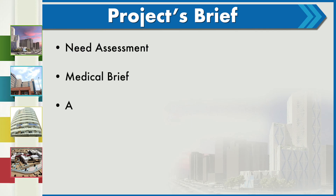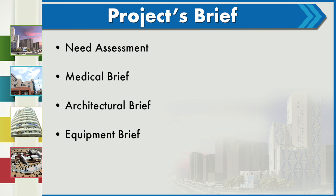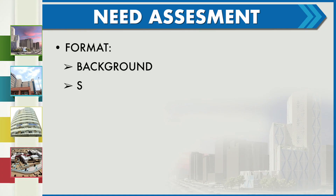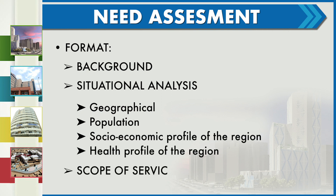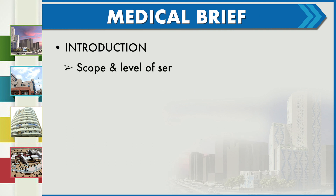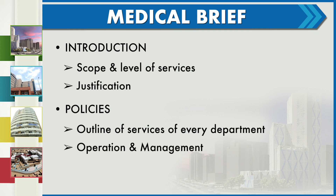The project brief will include the need assessment of the project. For hospital projects, it will include the medical brief, architectural brief, and equipment brief — combining all these prepares a document called the project brief. The need assessment will include situational analysis, geographical analysis, population statistics, socio-economic profile of the region, health profile of the region, and scope of service of the project.